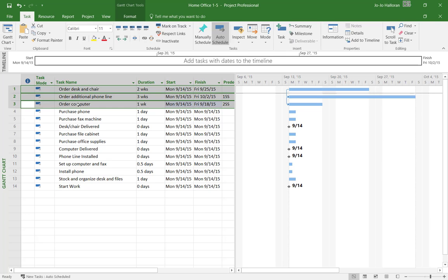All right, so we did step number 3, which was our start to start with task 1, task 2, and task 3. So now it wants us to assign a finish to start relationship for tasks 1 and 6, 3 and 9, and 2 and 10. Now make sure you're reading this correctly, because it's not saying finish to start between 1, 6, 3, 9, 2, and 10. There's 3 different requests it's asking you to do there, okay?